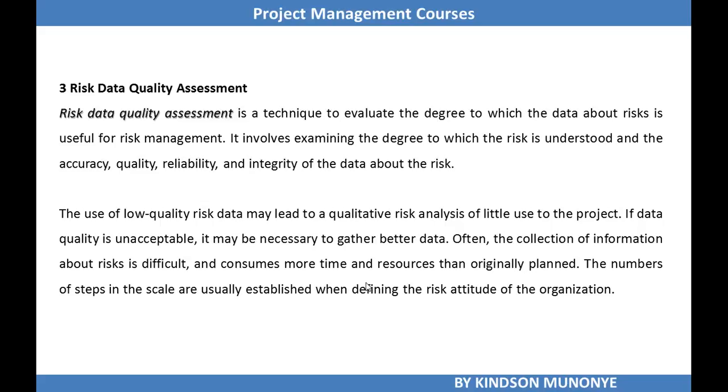The use of low quality risk data may lead to qualitative risk analysis of little use to the project. So what we are saying is that the risk data that has been gathered has to have high quality. It has to be accurate enough to add to the usefulness of the risk analysis. If data quality is unacceptable, it may be necessary to gather better data.